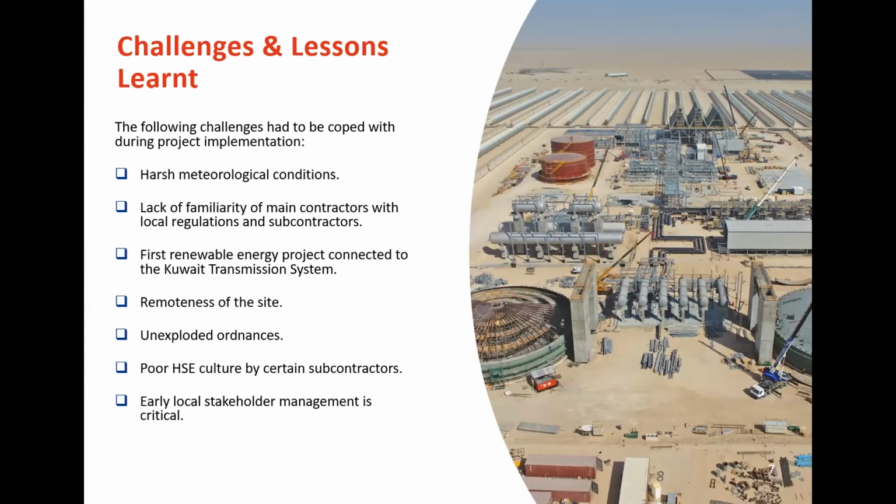So this represented a significant challenge because, on one side, there were some misalignments between the international standards used for the execution and the local standards. This was an aspect that had to be coped with, and significant efforts had to be made to make sure that all the approvals were obtained from local authorities, and deviations from the local standards were approved by local authorities as required by the project.